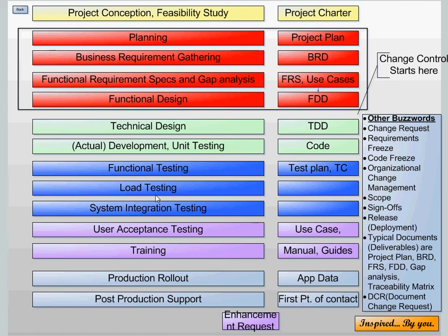When you're doing the testing, let's say that out of 100 functionalities that you're supposed to deliver, 95 are working and 5 are not working. Then you talk to the stakeholders and try to scope those out. Look at the way I'm using this word. They try to scope those functionalities and requirements out, and try to deliver the system and end the testing. Scoping in, it can be scoped in. These are all the regular usage of the word. This requirement should be scoped out is a very good way to say what should be scoped out and what should be kept.